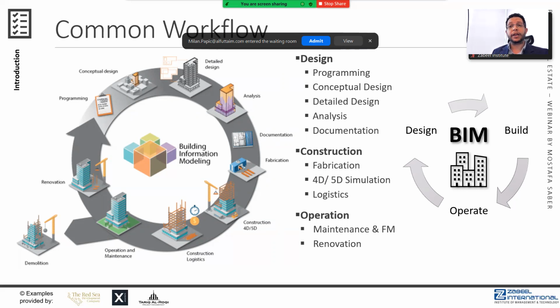The logistics required for the construction actually include what type of cranes or equipment you are going to use. Have you planned the access for the equipment required? And using 3D information and BIM with 4D capabilities, it enables you to visualize these things and plan them ahead of time.